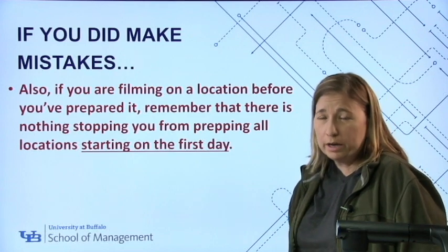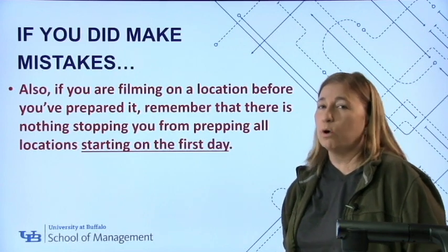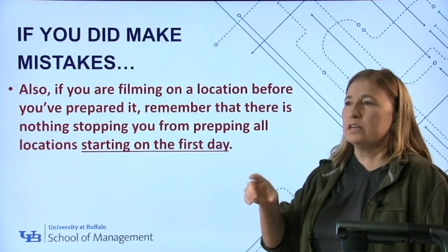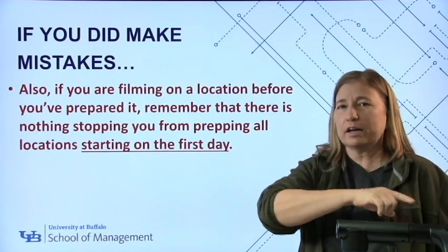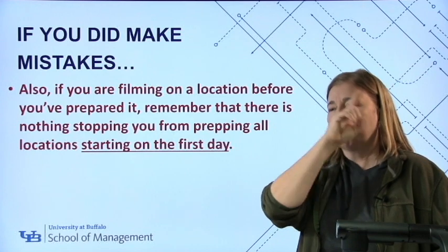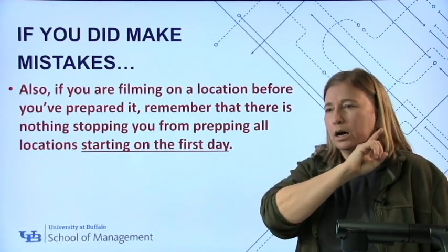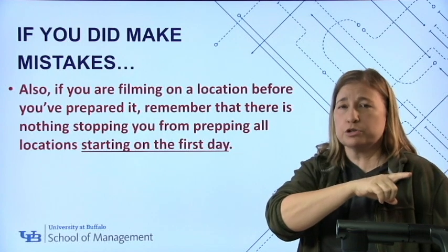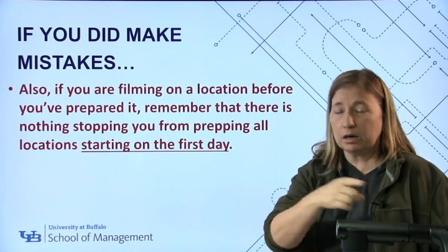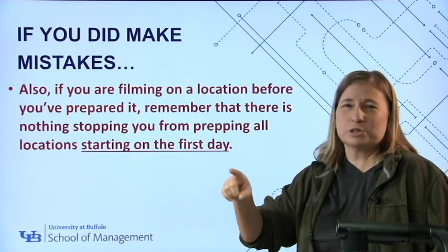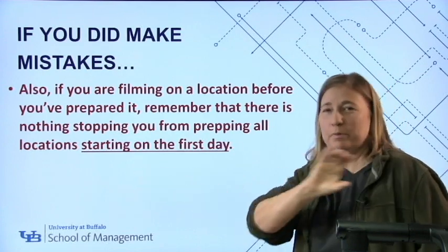You're not going to win any contests for least amount of money if you do that, because that's the equivalent of running out there, blocking all the streets, renting all of the generators, starting to pay all of the businesses that you're blocking, right? Compensation for a location that you then don't actually get around to using for quite some time, and you have to pay the whole time.